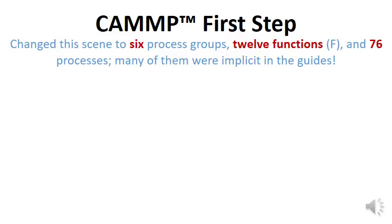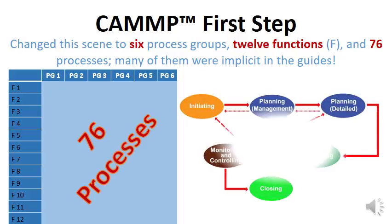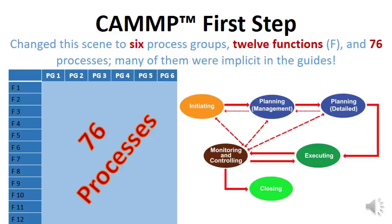These 76 processes are not just because we have 12 functions — many processes are embedded in the PMBOK guide implicitly but do not have dedicated processes. For example, the PMBOK guide says we have to appoint the project manager in the initiation process group but doesn't have a dedicated process for it; it talks about mobilizing a project management team but has no dedicated process; and there is a missing process for controlling the team. Similarly across many other functions and knowledge areas, which is why the number went from 47 to 76 processes.